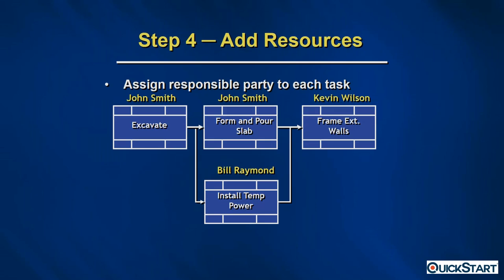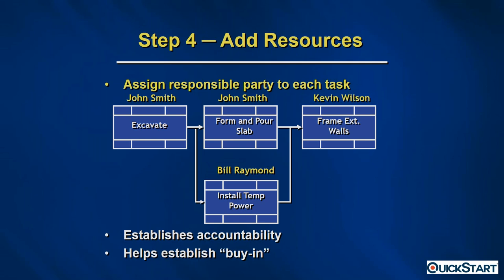Step four: assign resources. You can see we've added resource names above each one of these tasks. We're assigning the person responsible for conducting each task. This establishes accountability — we know who is accountable for what. It also helps with buy-in: once someone is responsible for a task and contributing to the project, they will work hard to make sure things get done right and on time.